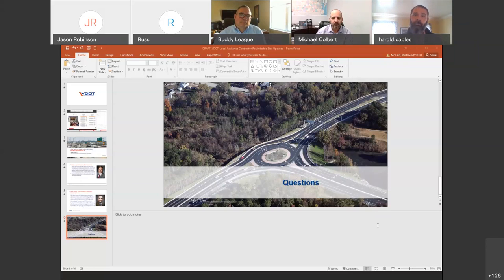Risky. From a bidding perspective, it can be risky. I say that not knowing whether or not a portion of the scope is going to be performed, or a scope may be removed. It can be very difficult to figure into the schedule and time frame if a piece of work is going to be added or not, and how that affects the overall schedule. We may be able to do it cheaper if you say it's not going to be in there, or vice versa. Conversely, typically our job overhead and general expenses on a project are built into the other items within the bid. And if an additive bid is at risk of not being let, are we going to end up in a potential hole at the end of the day for our overall expenses?